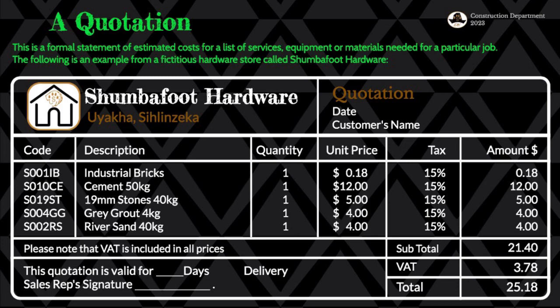And then delivery, you're going to see later on, that's a very important point. You're going to see later on that suppliers can also deliver their stuff, materials, equipment on site where construction is taking place. There's also transportation fees and all that needs to be paid. So you can check whether it's delivered by the supplier or you have to go and collect, which means that's another cost that needs to be estimated. That needs to be included in the estimations.